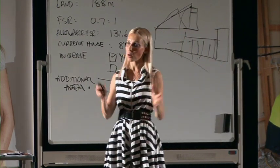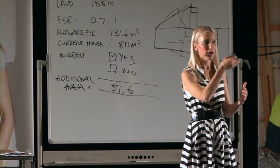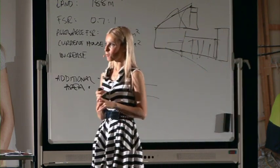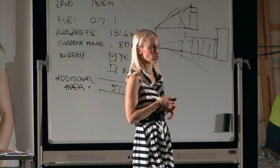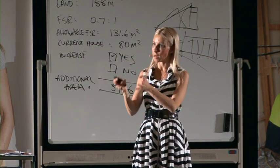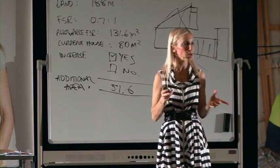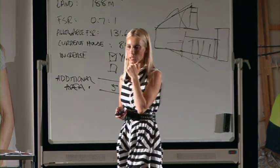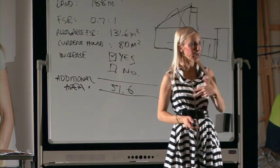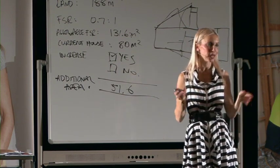On my current project I ripped off terracotta tiles — 3,360 of them — advertised in the Trading Post at a dollar a tile. The buyer sent their crew in and removed them all. I could have paid $2,000 in skip bin tipping costs, or sold them and got money back into the revenue. Also in your financial feasibility there's a section for sale of demolition items — factor all that stuff in. Get a quantity surveyor to do a scrapping schedule so you can write off all those fixtures and fittings you're ripping out.